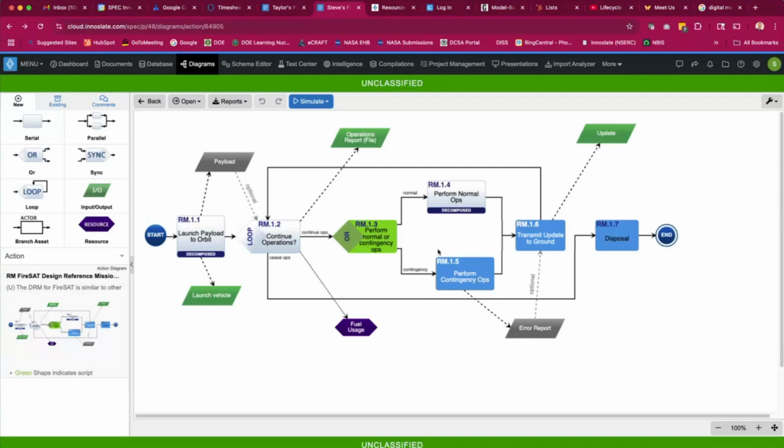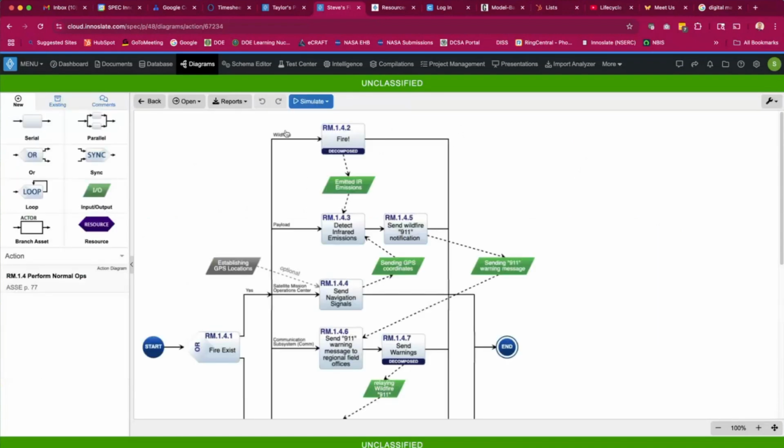A couple of ways you could deal with that: you can simulate at any level. So I can go down to this level, if this is complete enough, and simulate it here. Often what you do, and we did this on this high energy laser project because the simulation got to be so big at one point, is run this, create a distribution in the Monte Carlo, then use that as the action itself.